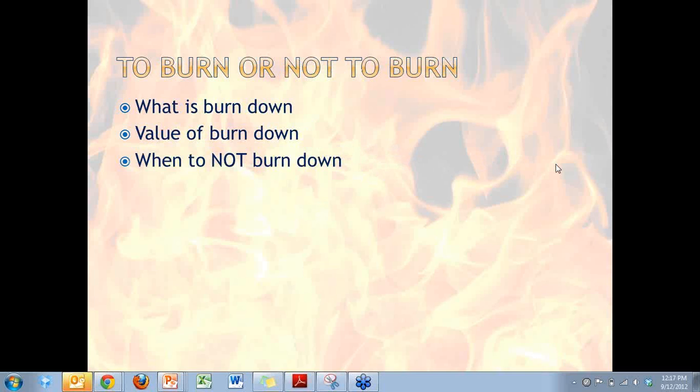So this is a very important point. Sprint burn down is the number of hours remaining. Say that again. The number of hours remaining to deliver the work in the sprint. So at the beginning of the sprint, the team committed as a group to delivering a certain amount of work, and they estimated the hours on that work. And it was a guesstimate, right? And what a burn down chart allows you to see is your progress, not progress toward that, but your work remaining to deliver that, right?